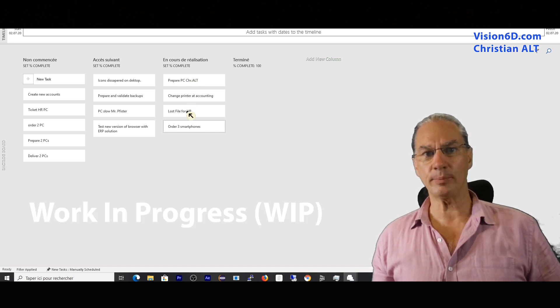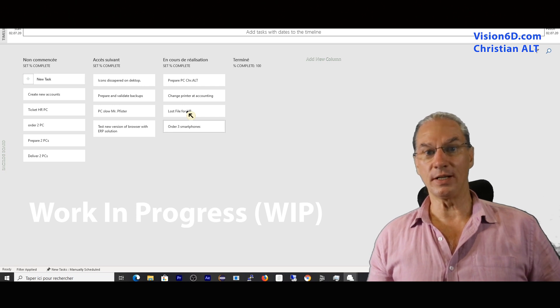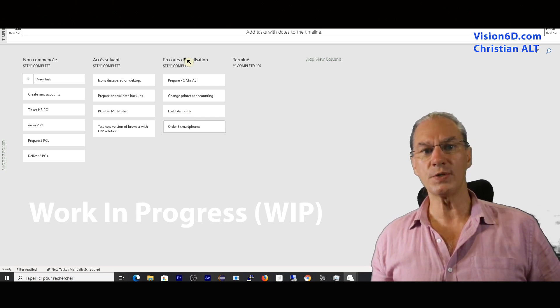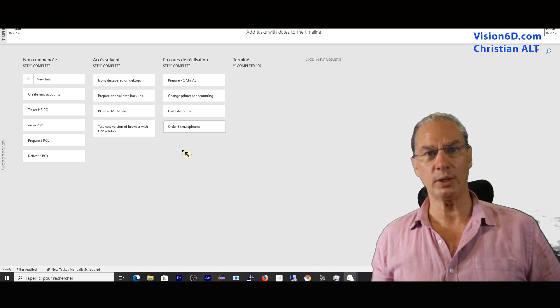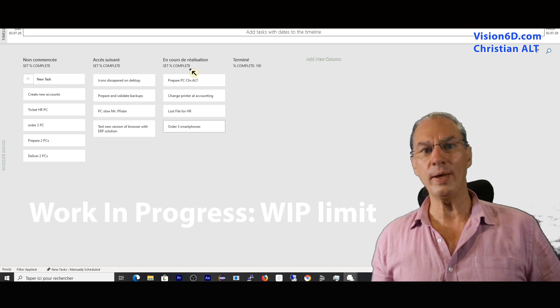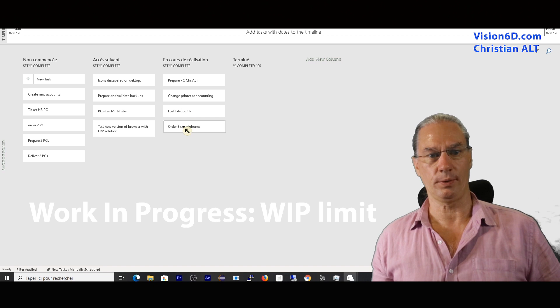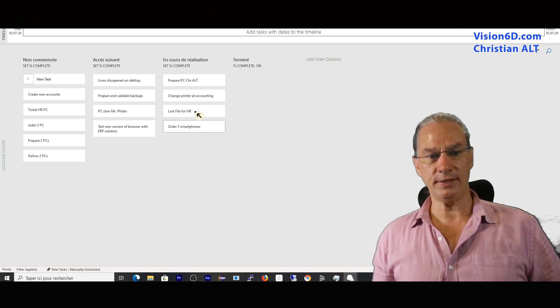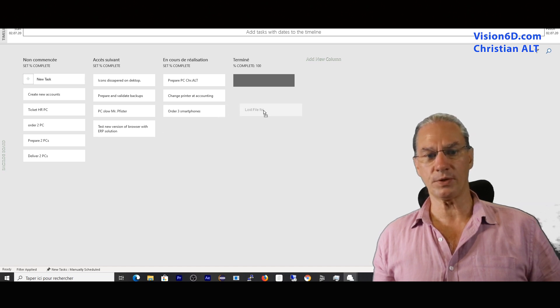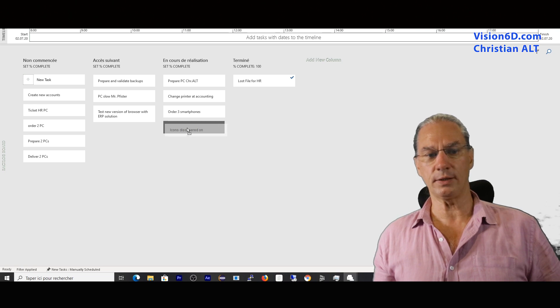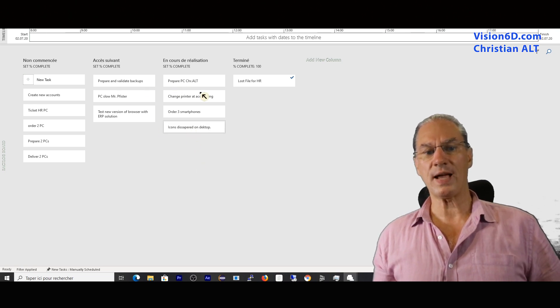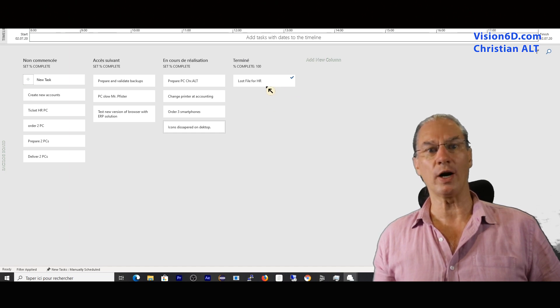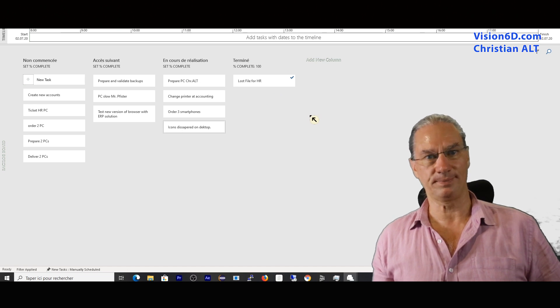With Kanban, there is a limit. It's the limit on work in progress. You set it yourself, that limit. It's not MS Project that will set it for you. In our case, we set the WIP limit to two elements per person. They are moving ahead. And let's admit here that the lost file was corrected. So this person now is going to take the next task. This is how it moves. And you see that in the end here, we arrived at 100% completed tasks.